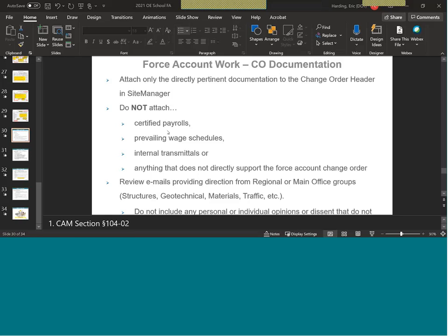Question that's asked, Eric, and I'm not 100% up on the latest specs when it comes to sales tax. Is overhead and profit reimbursed on sales tax? Yes. That wasn't Eric. Hi, Mike. Hi. Yeah, that used to be not reimbursable prior to the 2015 spec rewrite, but as of jobs let January of 2015 and forward, you do get profit and overhead on sales tax for your non-permanent materials.